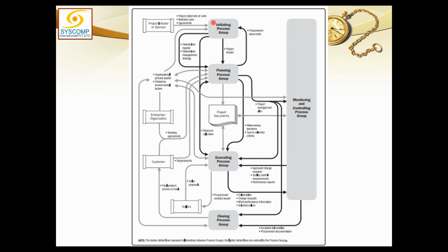So based on this decision, based on this statement of work, he will create the relevant procurement documents, which could be RFP, RFQ, EOI, expression of interest, or anything else.